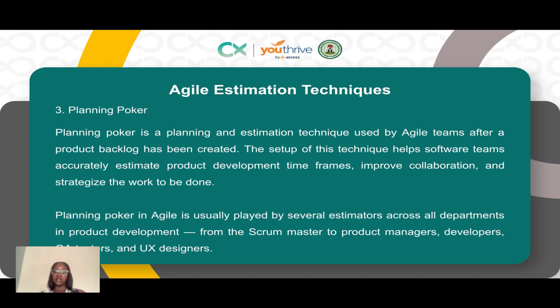Planning poker in Agile is usually played by several estimators across all departments. So you don't do it alone as the product manager or the product owner. You do it in collaboration with several other team members that can provide insights on the task, or accurately give you time estimation for each task or each product activity that is on your